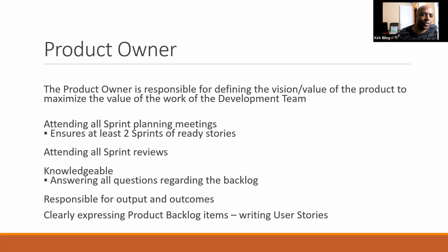I don't reject something outright. There's a product that I'm working on right now, and it has high visibility. So I kind of have to take scope creep, but only to a certain point. This item is a high value item; it's going to bring a lot of business to our company. So during the PI planning, I anticipated that we would definitely be getting scope creep, and we left wiggle room for the developers to be able to take on extra things.